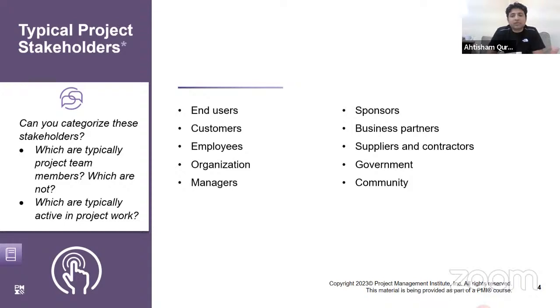And these are the people who are typically active in the project. Sometimes you may have a sponsor from time to time taking part in the project as well. Some government entities, if it is construction of a bridge, if it is a government project, then definitely you need to interact with government bodies for approvals. So all in all, whenever there is a dependency on some person, organization, entity, enterprise, internal or external to the project, then you're going to add them in your stakeholder register.